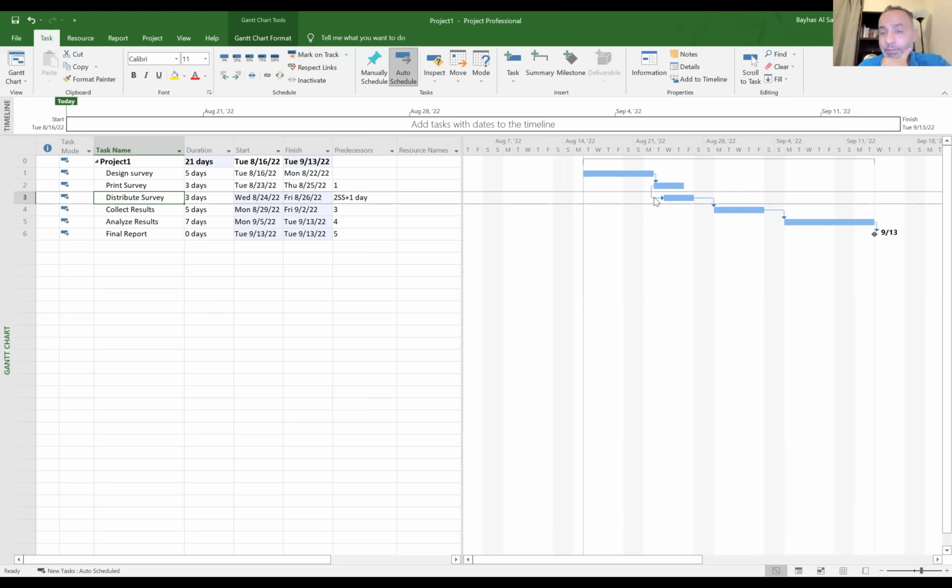Or another, probably more logical way, is that the relationship is basically finish to finish. Because, for instance, if printing the survey will take 5 days and distributing the survey will take 3 days, you will notice here that now something has become illogical, right?